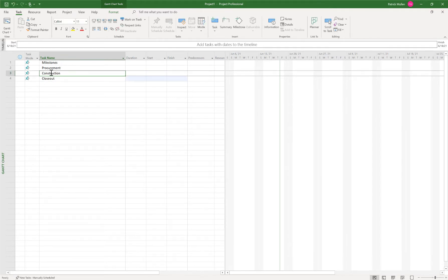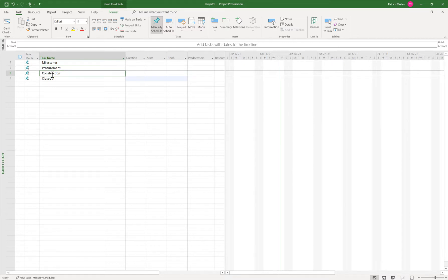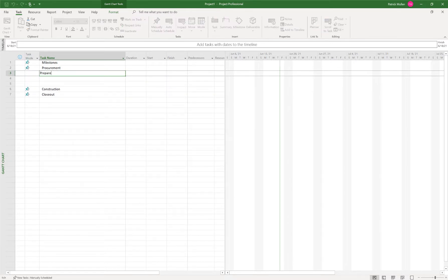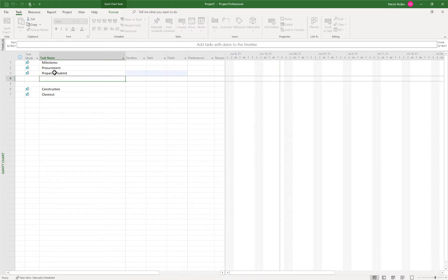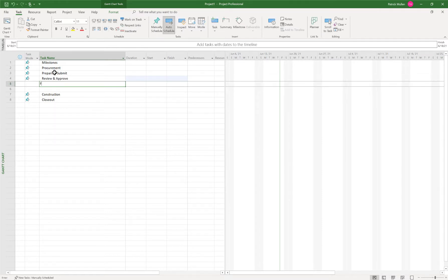And I want some WBS section sections underneath procurement. So I'm gonna use my insert key on my keyboard a few times. And I'm gonna do a prepare and submit section underneath procurement. I'm gonna do review and approve. And then I'm gonna do fabricate and deliver.